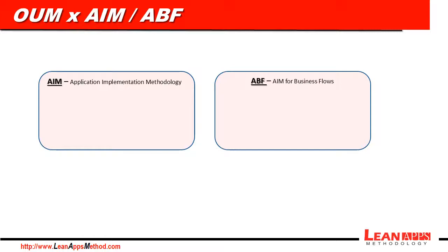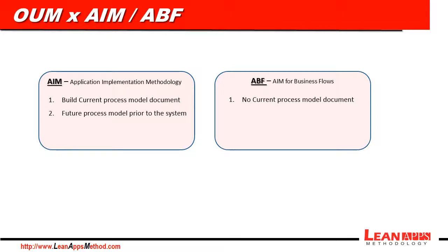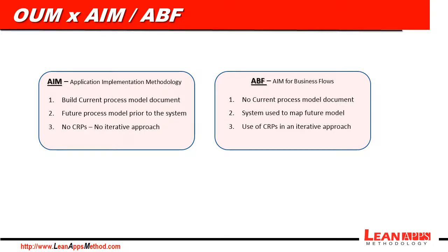Their main differences were: first, at AIM we had to build a current process model document, which we did not have at ABF, because that's a useless document after the project is completed. Second, at AIM we had to define a future process model prior to showing the system to the final users and configure it. But at ABF, the system was used to map the future process model with the users, along with the CRPs — the conference room pilots. Third, AIM did not use CRPs, but ABF used them in an iterative approach.